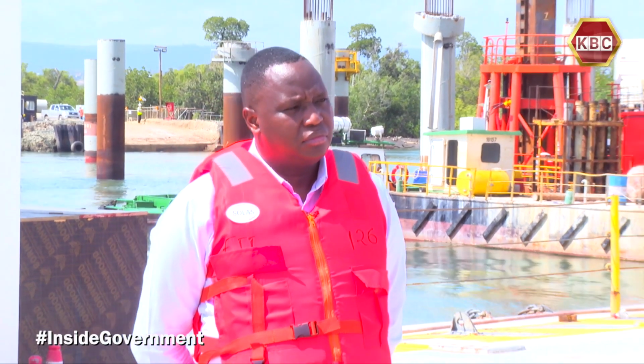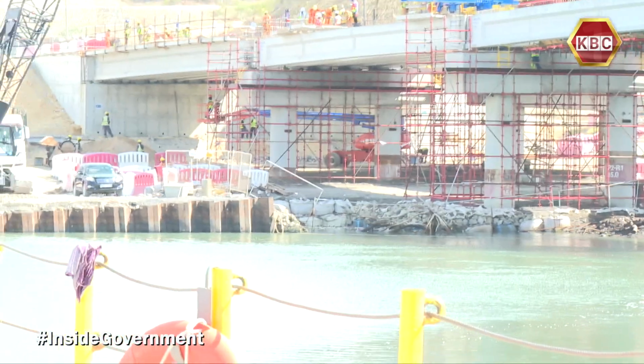And then we have the road from Lamu to Garsen. That road, 130 kilometers, is 100% complete, which means that we can evacuate cargo from Lamu safely to any part of this country and beyond. Currently, one of the major projects is the LAPSSET corridor, Lamu, Ijara to Garissa, and that is underway. We are at around 18% completion. We have a commitment that by mid next year, June to August, we should see it ready.